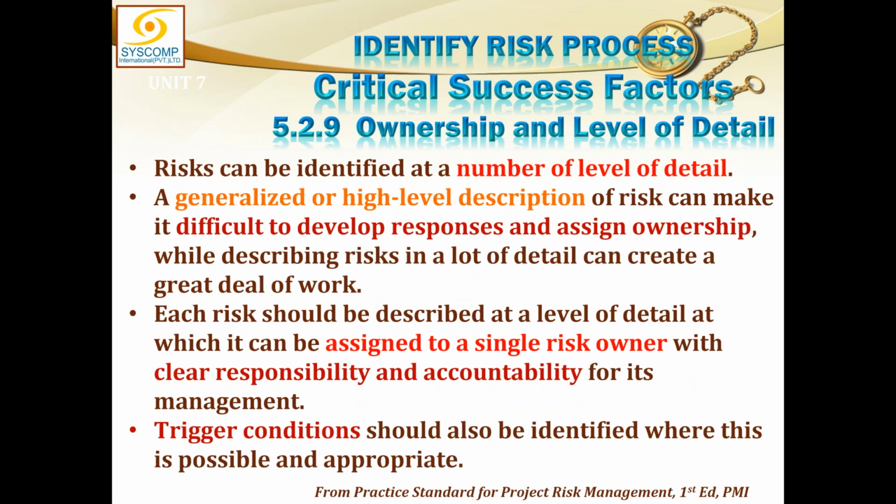When a risk is identified, you must identify a risk owner along with it, and the level of detail to which it has to be explored. The risk can be identified at a number of levels of detail. A generalized or high-level description of risk can make it difficult to develop responses and assign ownership, while describing risk in a lot of detail can create a great deal of work. So do not do either of those things. Try to do it appropriately. The right level of detail you must identify for that risk and assign somebody responsible for it, a risk owner. Each risk should be described at a level of detail at which it can be assigned to a single risk owner with clear responsibility and accountability for its management.